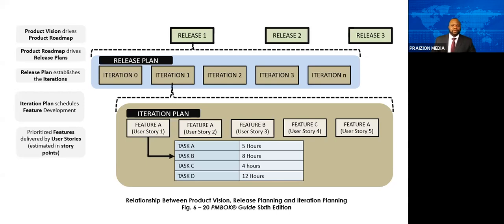So we could say, okay, to program a shopping cart, if we make that a 5, then we would make something like a web page a 1 or 3, for example. All right, but there's a lot more to that. And I would like you to go read that up. It is sort of outside the view of this particular task.